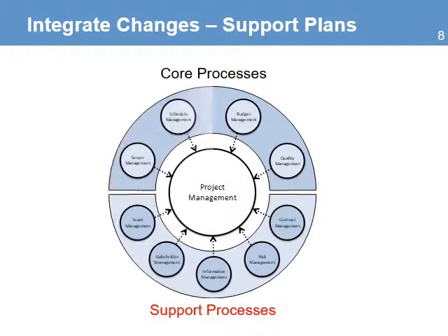Once you complete the review and integration of the core plans, you need to review to see if there will be any impact on the support plans. For example, adding a new activity means that a team member is assigned the responsibility to deliver the activity. There might be even risk associated with the activity, so you need to review the risk management plan and even the procurement plan if the activity requires the purchase of goods or services.